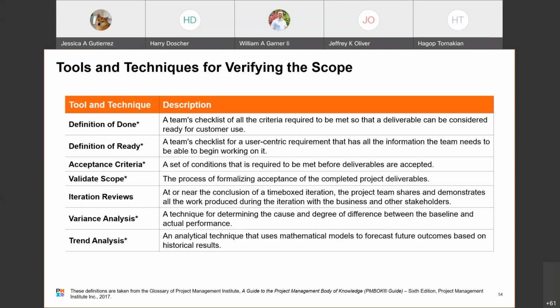Now, that could be a 2-week interval, it could be a 3-week interval. Within Scaled Agile, you also have what are called program increments, which are about 20 weeks, 18 weeks long. At the end of that, you want to be able to assess and do a review. You want to be able to do things like midpoint also.